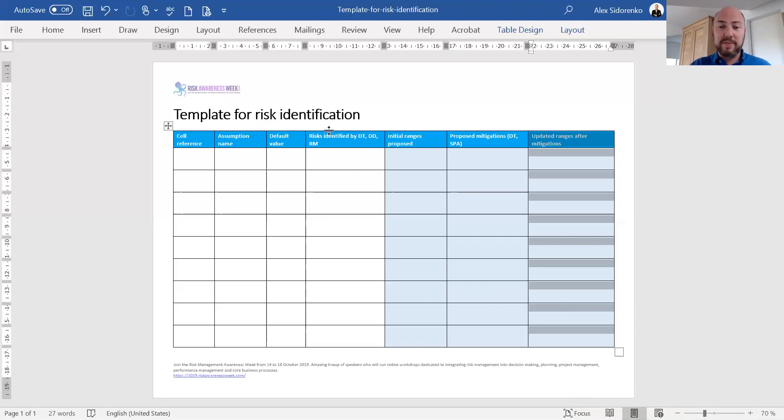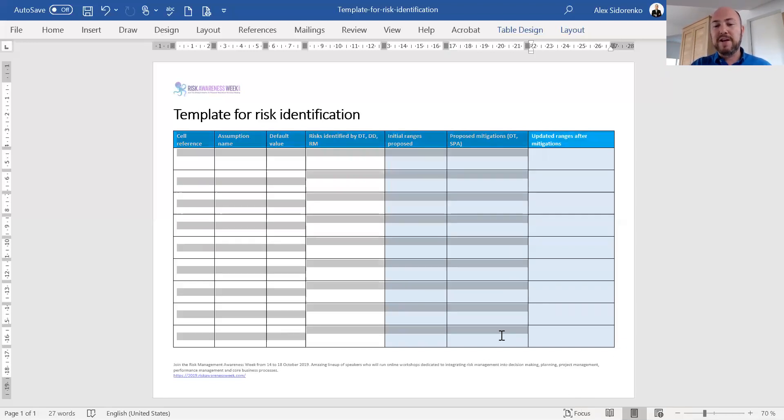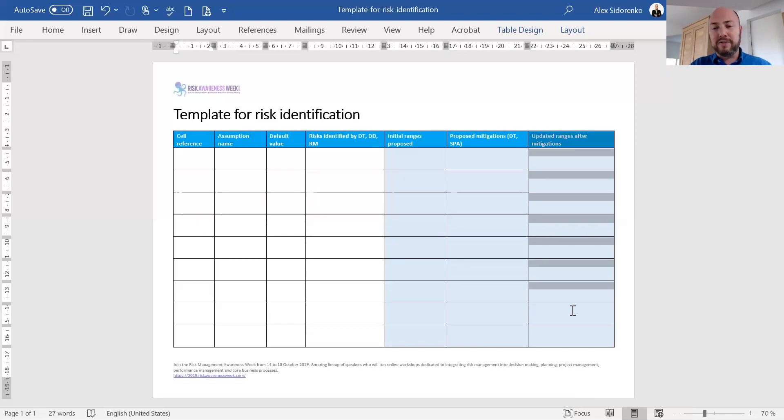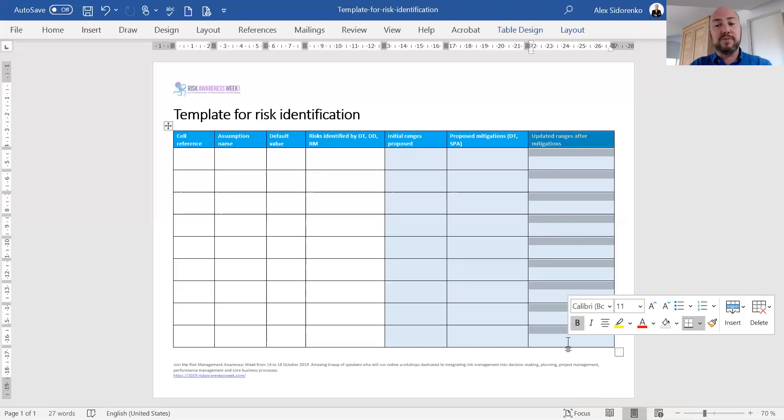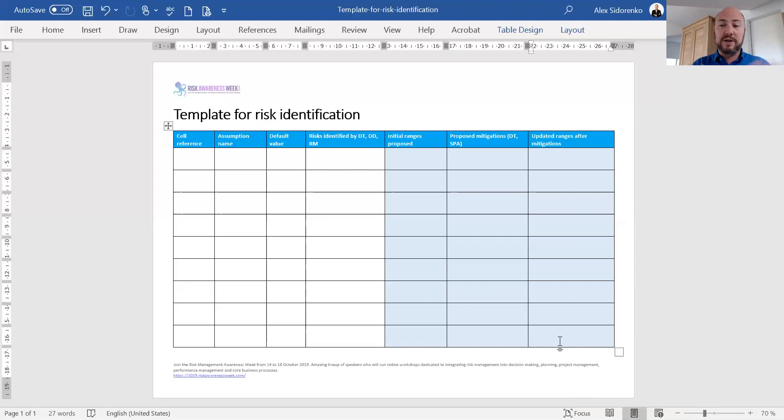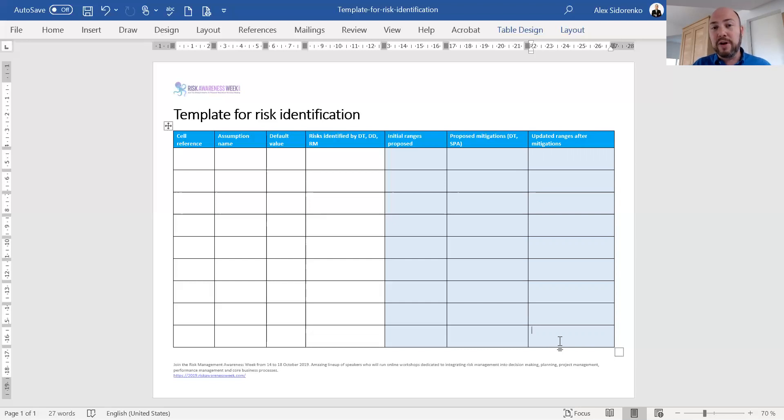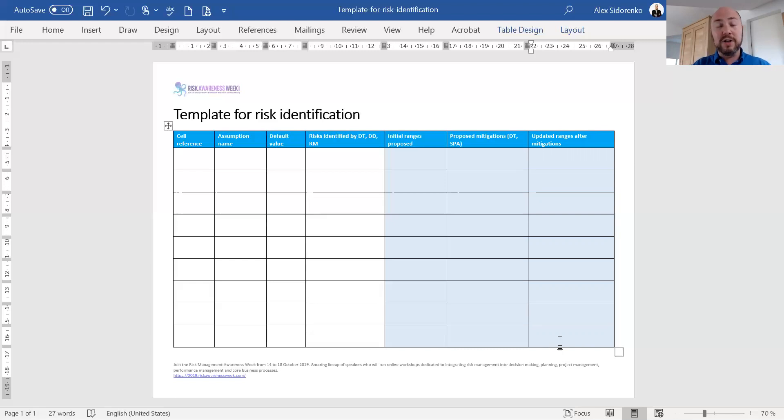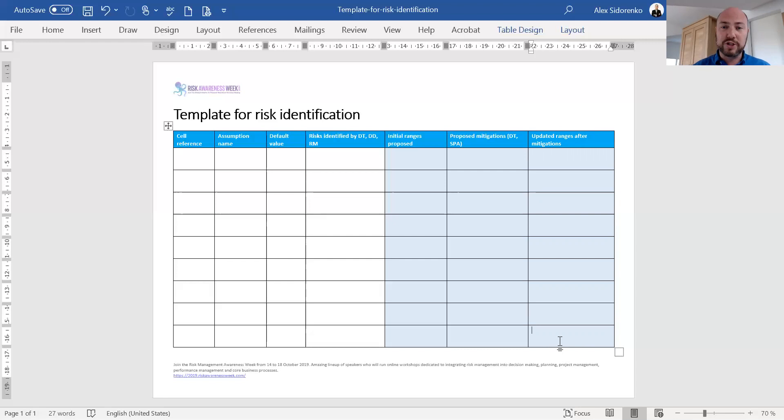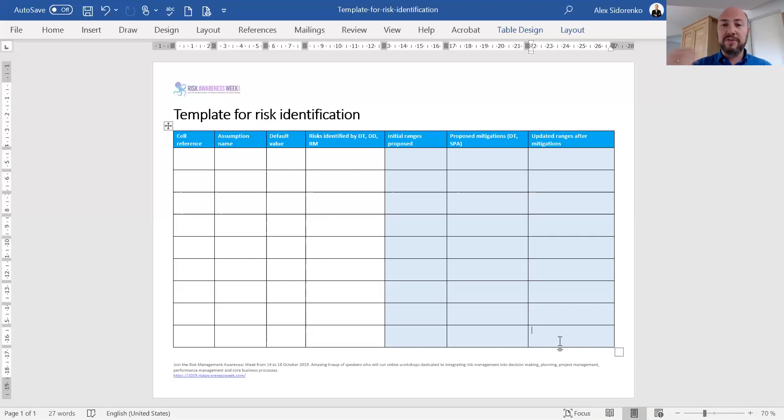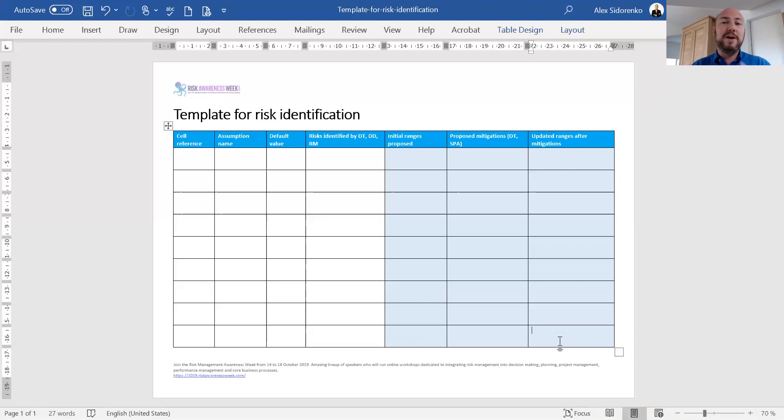Most of the work happens in the background with the actual team that prepared that decision. But then the final version finally gets to the decision makers, because we're saying we've tried to reduce this uncertainty as much as possible. This is how much uncertainty is left. It's probably impossible to reduce uncertainty to zero. So these are the risks that you need to acknowledge and take in order to make this decision. Are you comfortable with that? If the decision makers are comfortable, that's risk analysis done. But the decision makers may say they're not comfortable and still need more information. So you go back, investigate, maybe get a budget for additional mitigations, and rerun the simulation the third time based on all the additional analysis.